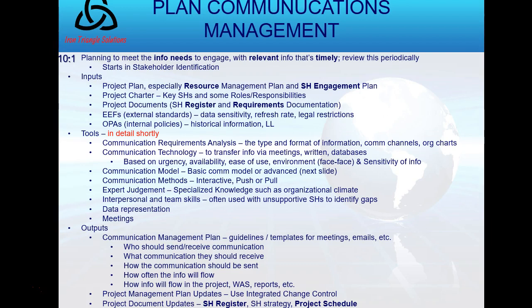And so you may plan communications periodically throughout the project, not just the first time. Okay? You'll do it, of course, early in the project life cycle, and you should review it at the start of each project phase. So again, at the beginning of each project phase, you will identify stakeholders, and that would be a good time to do that.